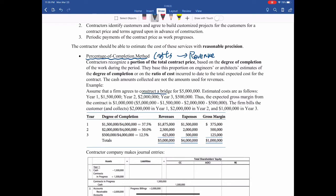There is an agreement for the construction of a bridge for $5 million, and this construction takes three years. The contractor has to prepare their financial statement every year. So how to report these $5 million over the next three years? Every year, the firm can estimate their costs, and these numbers are actually available from the engineers. First year: one and a half million. Second year: two million. Third year: half million. So this is the distribution of expenses or costs in the next three years, and the total is $4 million.